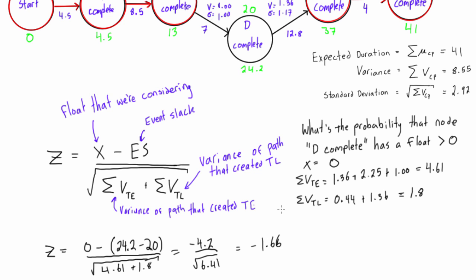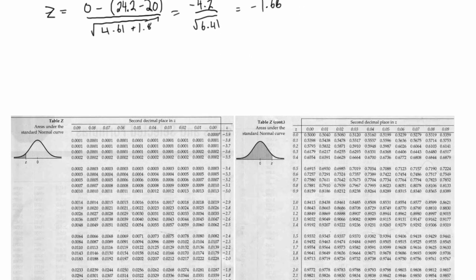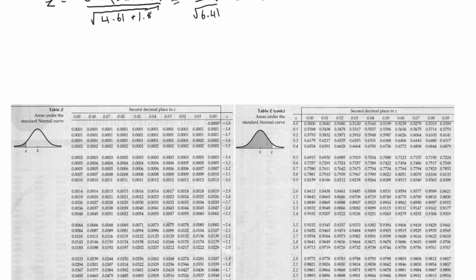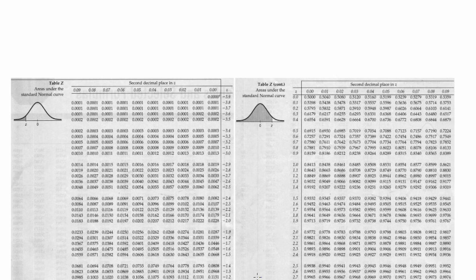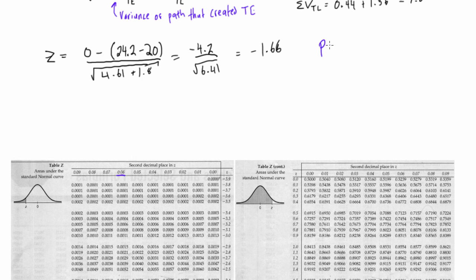We take that z-score to our z-score table. Our value was negative 1.66, so we find negative 1.6 in the row and 0.06 in the column. Combining those gives negative 1.66, and where they meet we get 0.0485. So the probability corresponding to z equals negative 1.66 is 0.0485.